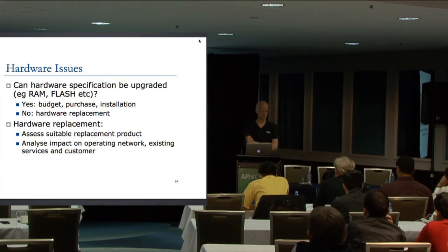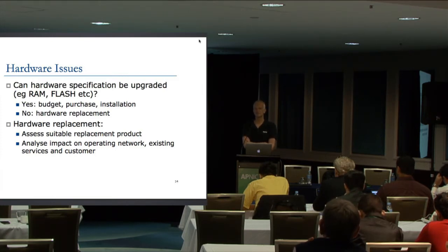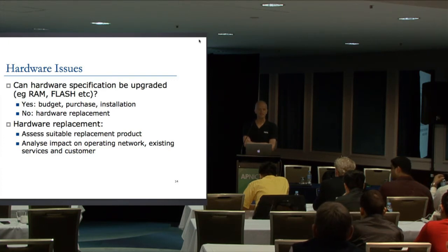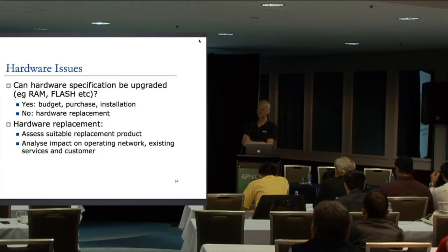There's one operator I've helped who was not really that big at all. It took them over a year to get to a place where they could actually start turning on V6. So if you're sitting here thinking, yeah, I'll just wait until V4 starts being switched off, this hardware upgrade, dealing with the hardware in the network, is going to eat time. And when everybody else is running off to get router upgrades and so forth, yes, of course the vendors are going to be happy, but you know what happens to the lead times. They push out. And if lead times push out, and then your customers, etc., you know where that's all going.